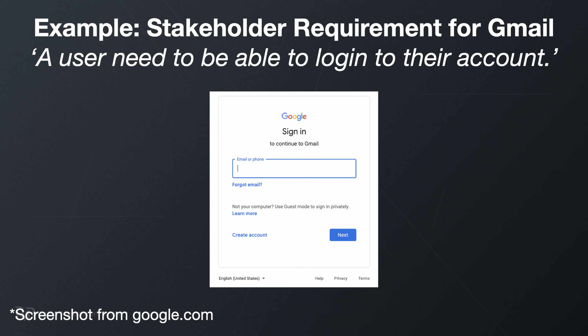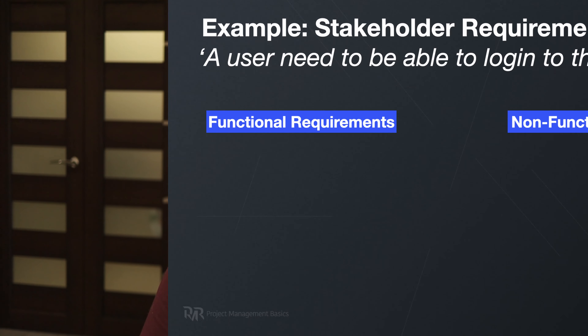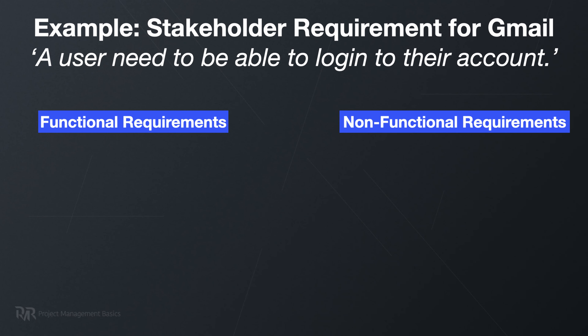For example, let's take a look at Gmail. A high-level stakeholder need might sound like: a user needs to be able to log into their account. From here you will derive a lot of functional and non-functional requirements. For functional requirements, I recommend that you stick to user stories as much as possible — that's one of the simplest forms of requirements documentation you can use.